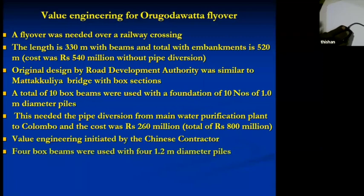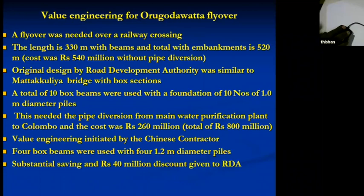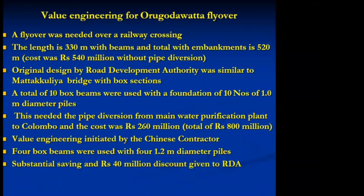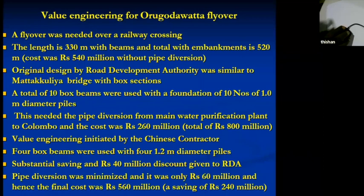We used four box girders and four piles of 1.2 meter diameter. There was a substantial saving in the pipe diversion cost — it was reduced to only 60 million worth of work. RDA was also given some discount. Out of 800 million, we completed the bridge for about 550 million — a saving of 240 million. That was a significant achievement.